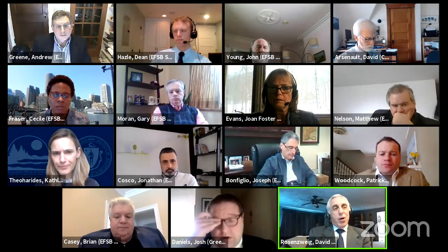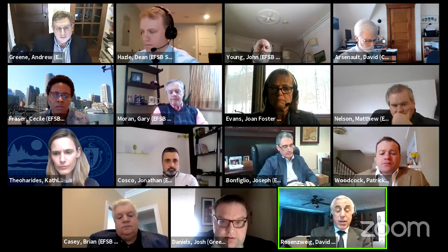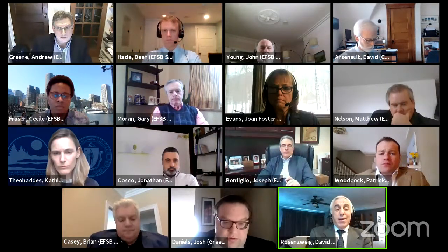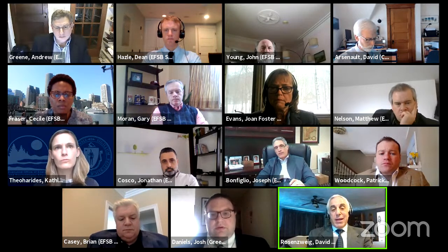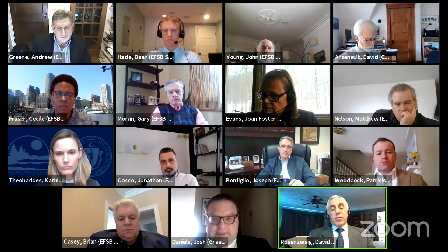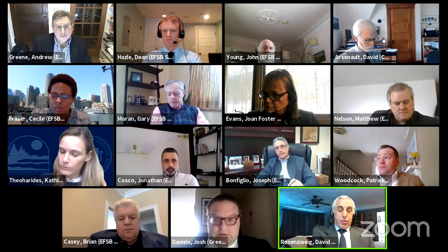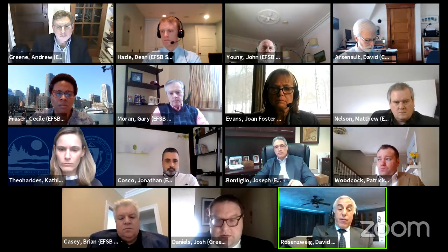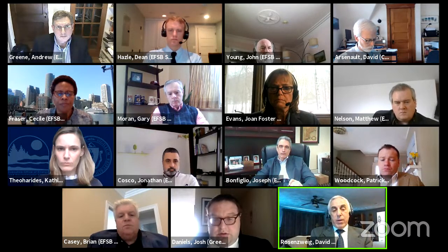That's a fair point. And I'm also thinking broadly, because this has come up in prior siting board cases. The statutory term of construction and commencing construction can actually mean engaging in financial commitments and doing preliminary site work. And I would like this condition to be interpreted in terms of construction as being physical in the ground construction, and to exclude other elements of commencing construction which have come up in other cases, so that the company can enter into commitments to engage its contractor, purchase materials and supplies, and do borings in advance of the August 1st date, which would be, in my mind, if it has to go out that far, a physical construction window that wouldn't be triggered until the settlement discussions have been completed or that date has been achieved.